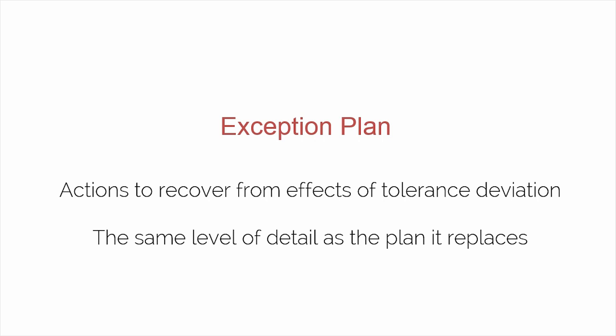Should a team manager forecast that the assigned work packages may exceed tolerances, he should notify the project manager by raising an issue. If the issue relating to the work package can be resolved within stage tolerances, then the project manager may take a corrective action by updating the work package or by issuing a new work package or packages and instructing the team manager or managers accordingly.